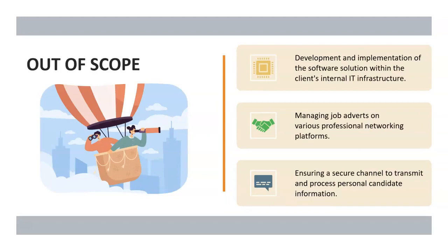Also, based on the client request, we'll be searching for candidates in the candidate pool. However, if we don't find the right candidates, we'll need to post job adverts. And the managing of actual job adverts on various networking platforms such as LinkedIn or Indeed will not be in scope. Also, we'll be processing a lot of client information and candidate information, so ensuring a secure channel to transmit and process personal and sensitive candidate information will not be in scope of the project.